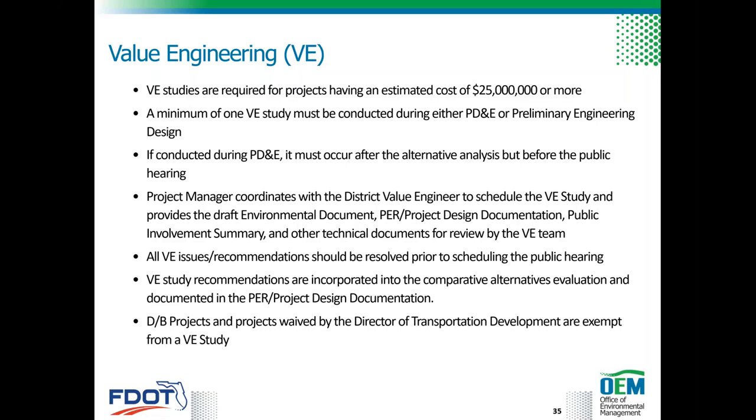If the value engineering study is conducted during the PD&E phase, it must occur after the alternative analysis is complete and before the public hearing. Also, the value engineering issues or recommendations should be resolved before scheduling a public hearing.